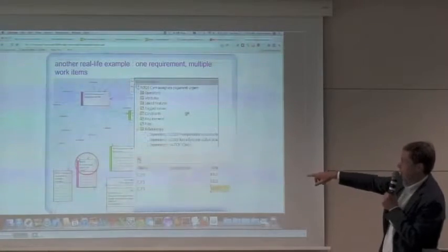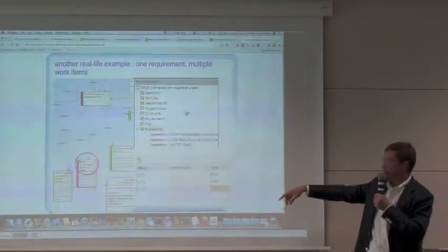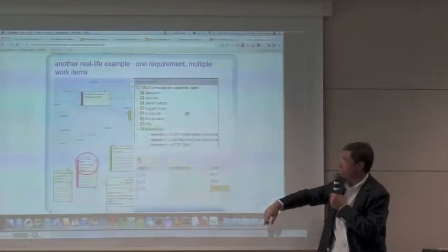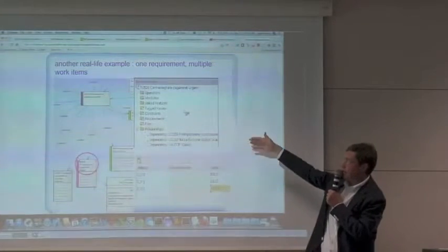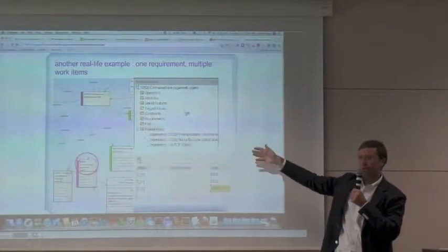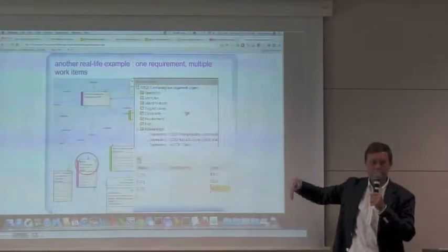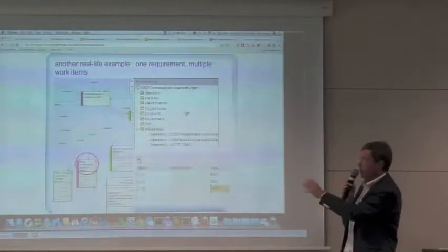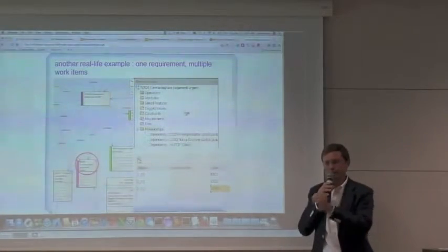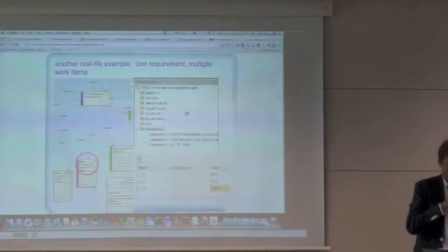Another example, if I find a change request, the change request is tagged with a work item. I can find the work item on my tool and, using a relationship, understand why that work item is there, with which deliverable it is connected, with which issues and so on. So I can understand why that change request is there, why there is some configuration change.